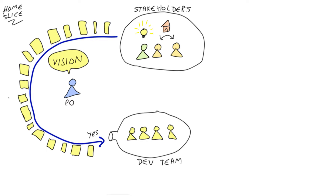Here's why: Malik works with a team of four developers. Let's say they can complete on average three to four stories per week. But ideas are easier to come up with than working software, and the stakeholders come up with, let's say, ten ideas on average per week. If Malik tries to satisfy all the stakeholders, pretty soon he'll get a huge, unmanageable backlog.